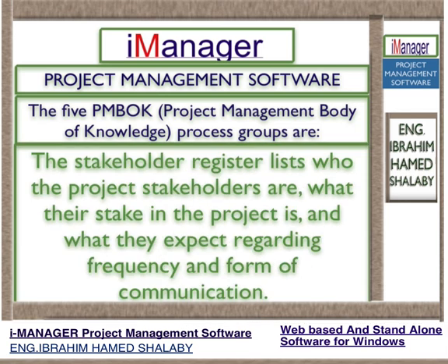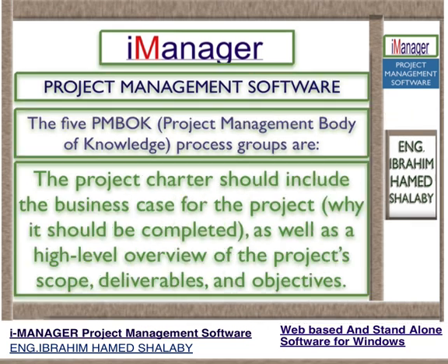The stakeholder register lists who the project stakeholders are, what their stake in the project is, and what they expect regarding frequency and form of communication. The project charter should include the business case for the project, why it should be completed, as well as a high-level overview of the project scope, deliverables, and objectives.